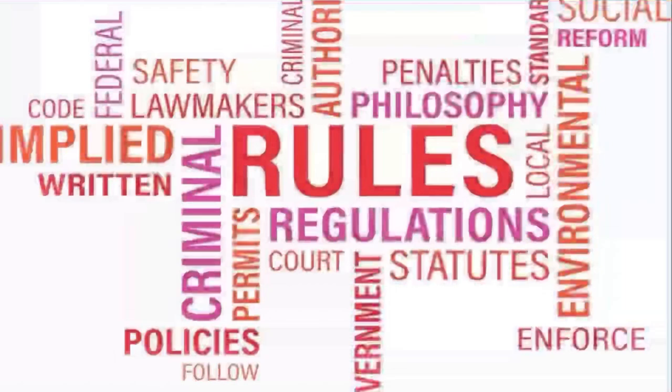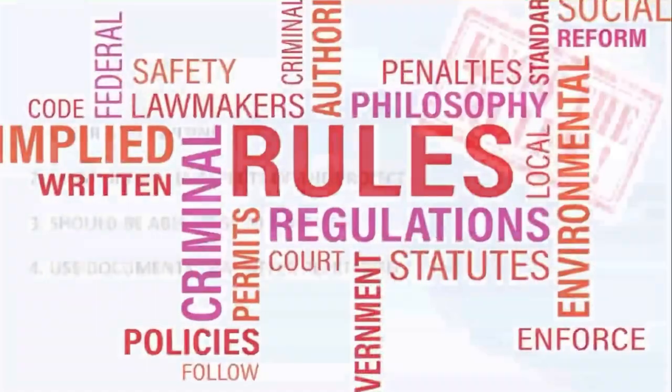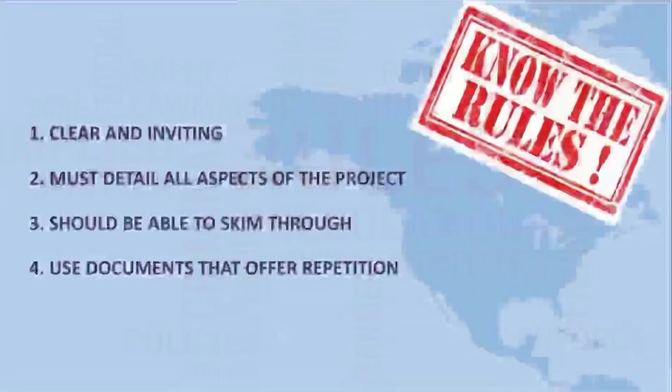So guess what? You need to make money on that item, because we are in the business of making money. We're not in the business of drying buildings. So if I have to pay the police department to put up barricades across the street and pay them to watch that, then we're simply going to add that to the bill. So you got a lot of work to do. You have to know the rules.